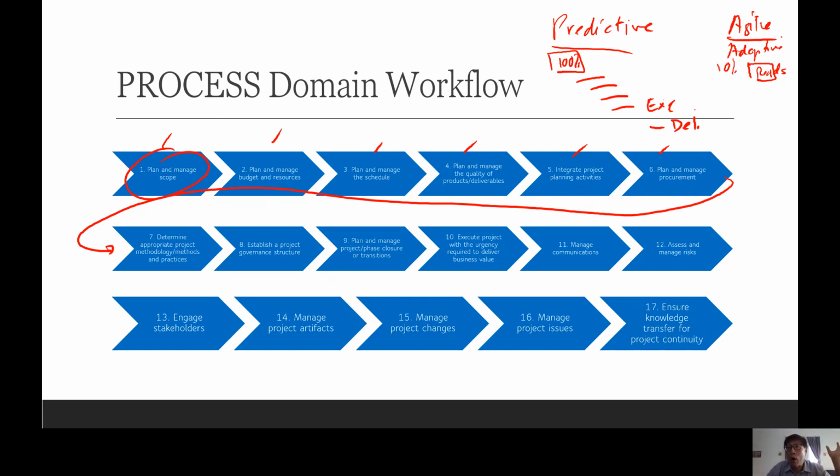So whatever requirements we have at hand, we do that work first: we plan out, we execute, we deliver. Then when the subsequent one comes in, we plan, execute, deliver. We plan, execute, deliver. So we have batches of delivery, and we have given special names for it. We call it Sprint 1, Sprint 2, Sprint 3.